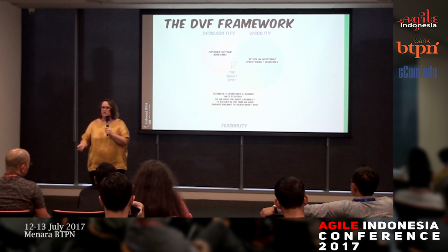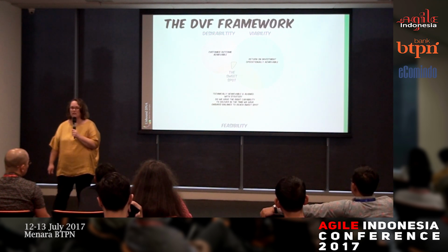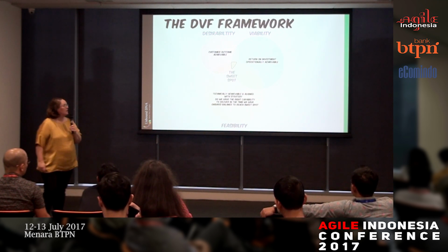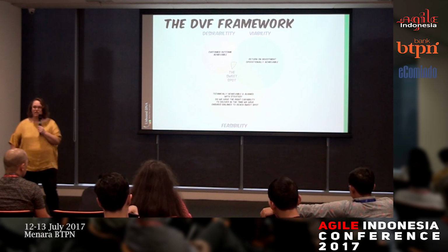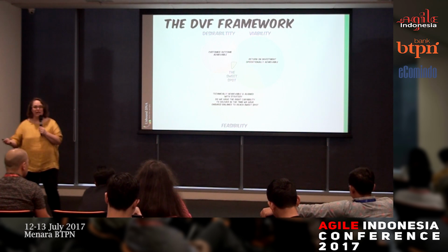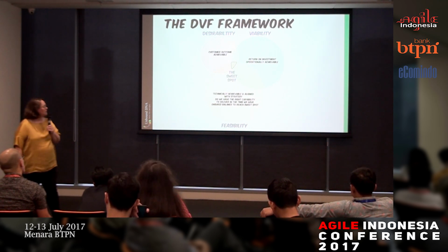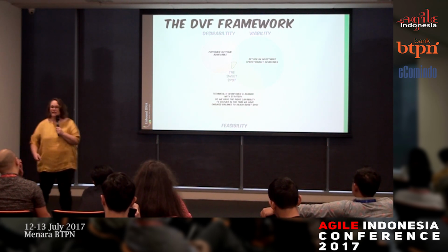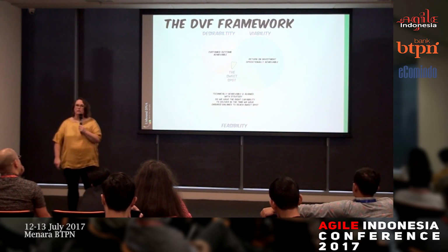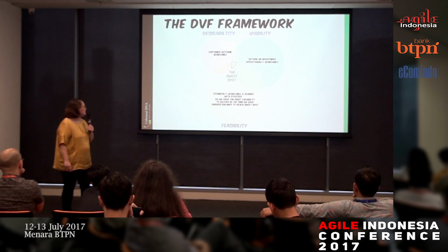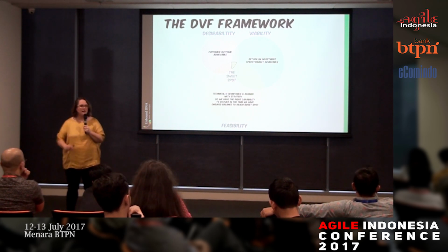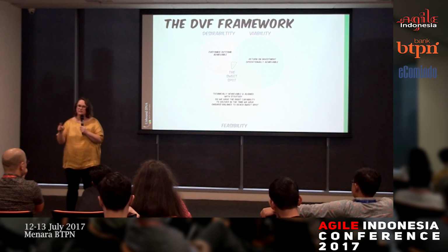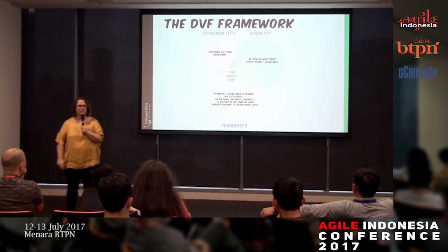Desirability. Is there a customer that wants this? Is it a customer need? Viability. Will we get a return on investment on this? Is it operationally achievable? Can we roll it out successfully? And feasibility. Is it technically achievable? Is it aligned to our roadmaps of where we want to go technically? Do we even have the right capability to deliver this? And then lastly, looking at all these 3 lenses together as one to say, is this the right thing that we should be focusing on?